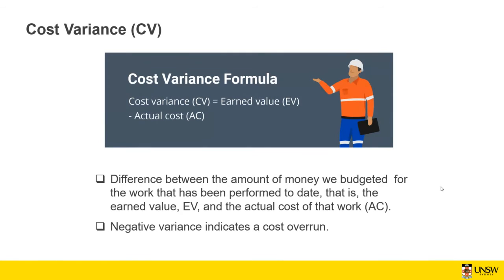So we are 6 months past and we're supposed to spend 30K, which is the planned value, but actually we finished 2/3 of the job. But 2/3 of the job means that we're supposed to spend only 20K by that time. So our earned value is 20K. But actually we spent, let's say, 40K. So which means that we are 20K higher than earned value. Actual cost is 20K higher than the earned value.